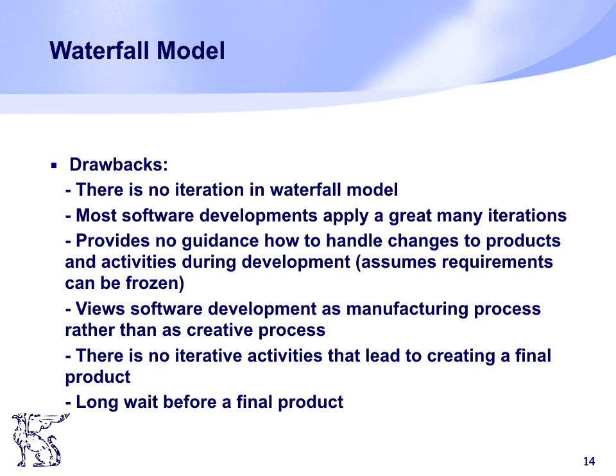There is one more problem: no overlapping of phases. This model recommends that a new phase can start only after the completion of the previous phase, but in a real project this cannot be maintained. One other issue with the waterfall model is that we get the product at the end. You cannot take benefit of early release or getting value during the development process. That's one more drawback of this model.